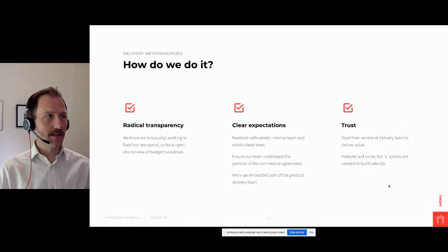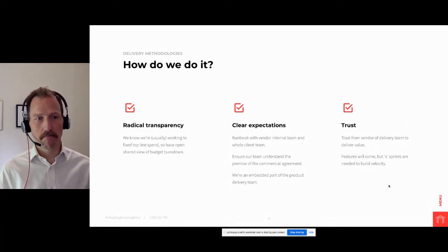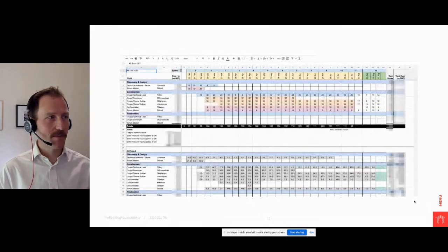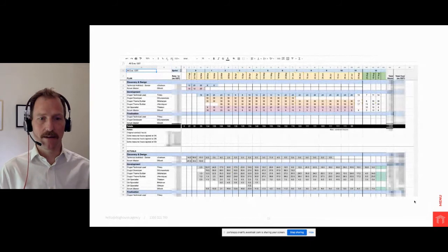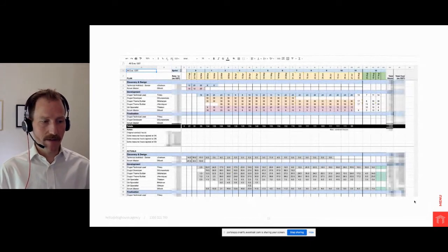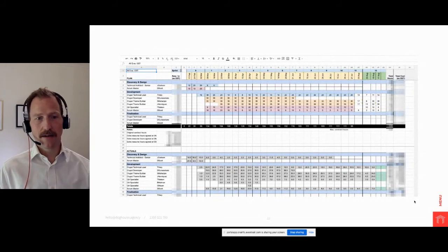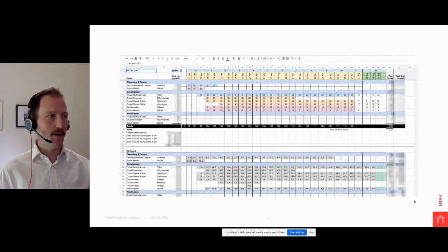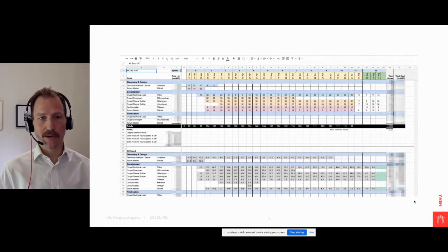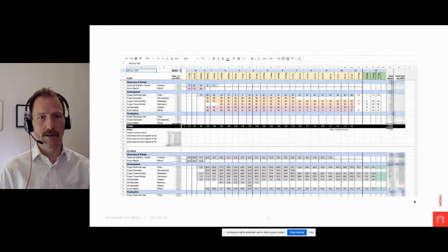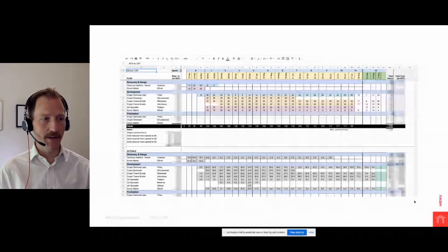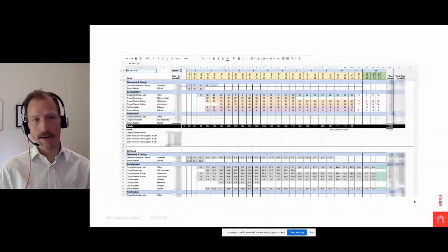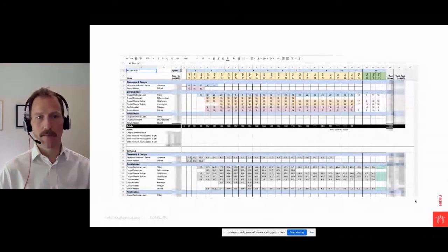A little insight into how we do some of that is through sharing. This isn't just time tracking from within the Doghouse team, it's open and shared with VCAT so day to day I can have a live view of expenditure and burndown. What are we planning to spend per sprint per day and what are we actually spending, what are we actually consuming in terms of that burn down of that budget. Who is away on what days so where do we make up time.